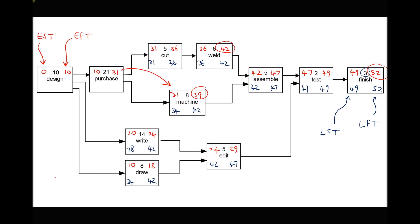When we get to the purchase task, we look for the latest it must be finished. Machining would allow purchase to finish on day 34, but cut requires it to be completed by day 31. Therefore the latest finish time for purchase must be day 31, otherwise the cut task can't take place on time. 31 minus 21 gives a latest start time of day 10. Applying the same logic to design: purchase needs to start by day 10, write by day 28, and draw by day 34. But in order for purchase to start on time, design must finish on day 10.